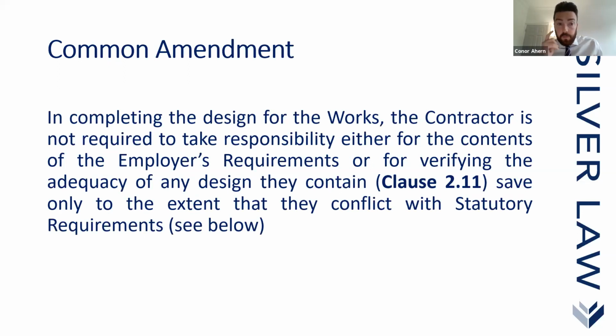So now we're dealing with the operative design clauses, which are contained from about clause 2.11 to 2.18 within the DB form. A common amendment is that in completing the design for the work, the contractor is not required to take responsibility either for the contents of the ERs or for verifying the adequacy of any design they contain, which is clause 2.11, save only to the extent that they conflict with the statutory requirements, which we'll deal with below.